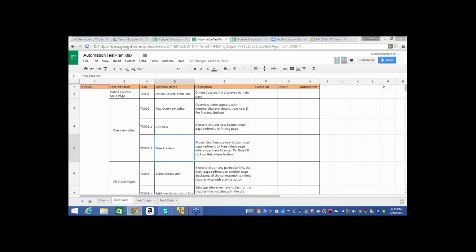This all typically happens in real cases also. For example, we need 6 people to get this project done. Right now we have only 4 people. We have already requested hiring for 2 people with our management. Hope that they will be coming. In the worst scenario, if they don't come, that's when you will revisit and see if the same 4 people can take up those tasks, and then we can distribute the tasks to others, or can we stretch into it. Something like that happens. That will be done after 2 days. But now you should go with the assumption that they will join.